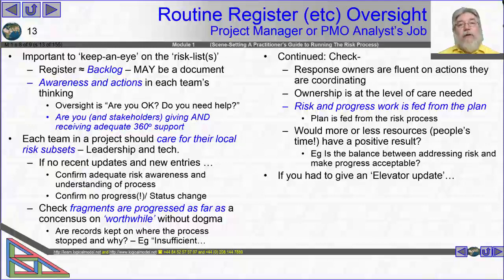So routine register oversight is going to say, is the log being updated? And if it is, then I can have some confidence stuff's going on. And if it isn't, I'm going to go and investigate. And when I investigate, the question is, are all the people who could be supporting in the right way or not? And the last question that I'm going to examine on this slide, we've got one more to go in a second,